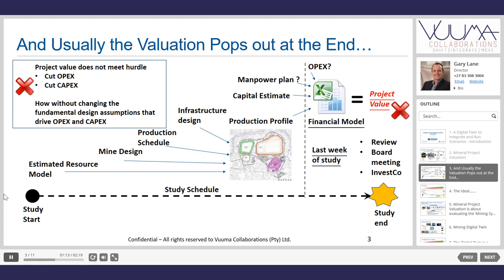Unfortunately, the financial model — which is generally an Excel model — pops out in the last week of a study. So there might be a one-year pre-feasibility study, and the financial model appears one week before the end. When the NPV doesn't meet the hurdle rate, there's a big panic in the last week to adjust it. Discussions arise like cutting OPEX by 10% or CAPEX by 10%, but the real levers are the mine design, production scheduling, infrastructure design, and equipment choice. You end up presenting numbers that are unrealistic, and the project will never be implemented meeting those performance parameters.